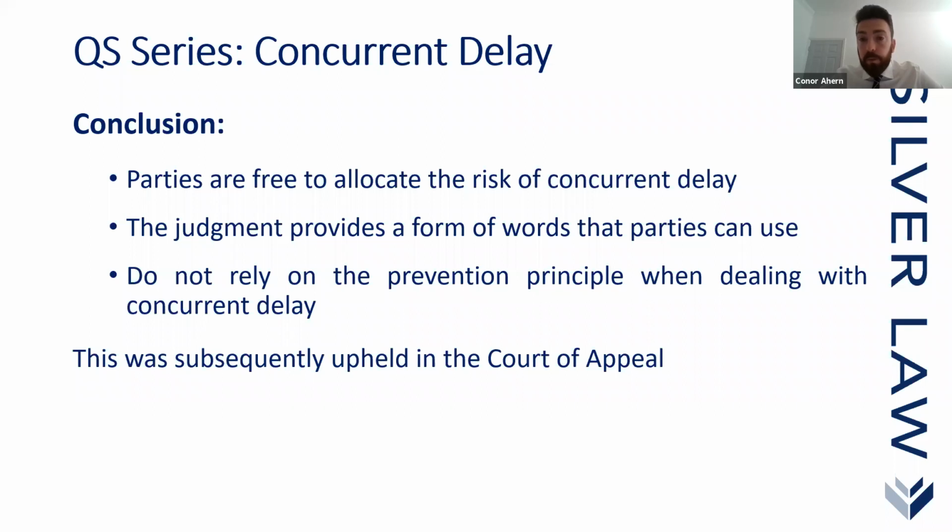Basically, what you're saying is that express terms agreed in the contracts will take precedence over the prevention principle, and parties looking to rely on it will be unsuccessful. So that was the finding in the TCC, and this was subsequently upheld in the Court of Appeal also. It's an important point to bear in mind.